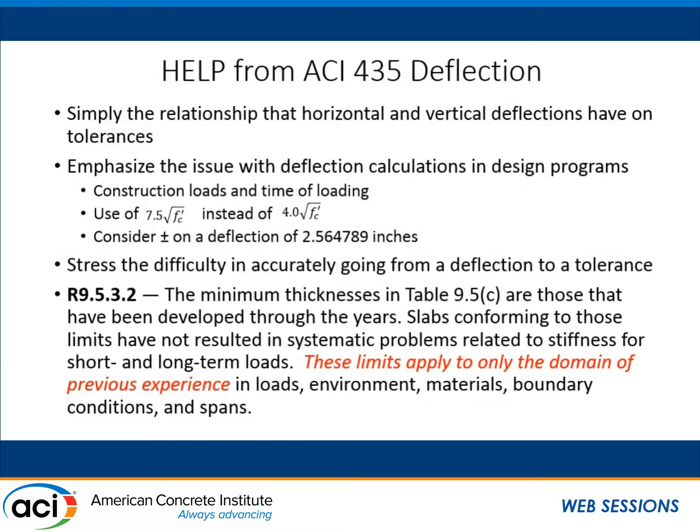The question is, what can we do with those measurements? Can they really be used for acceptance or rejection since the contractor took them? So we are seeing, as an engineer, requests, or actually specification requirements, that make us take them at different times: when the shores are in place, after the shores are removed, and 6 months later. So you can collect the information. The difficulty is, what do we do with that information on this project? It really helps on future projects, but at this point, we haven't got it worked out as to whether an independent party is going to do it or the contractor is.